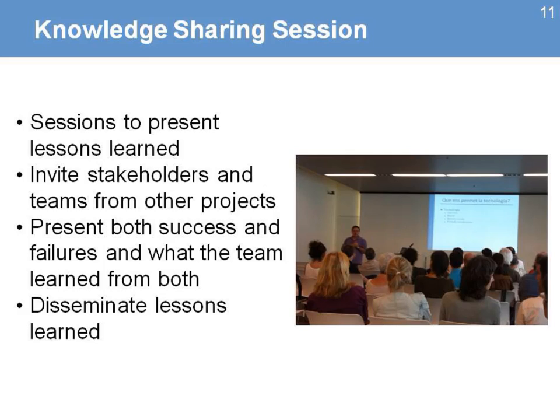One way to do that is to have a knowledge sharing session. Again, you can invite different people in your organization to whom you're going to be presenting the lessons learned. You can have a presentation with slides, videos, pictures about the project, and you invite stakeholders and teams from other projects in your organization. It's up to you to define who's going to be coming to that. The idea is that you invite people who you know will benefit from the lessons you learned in the project.